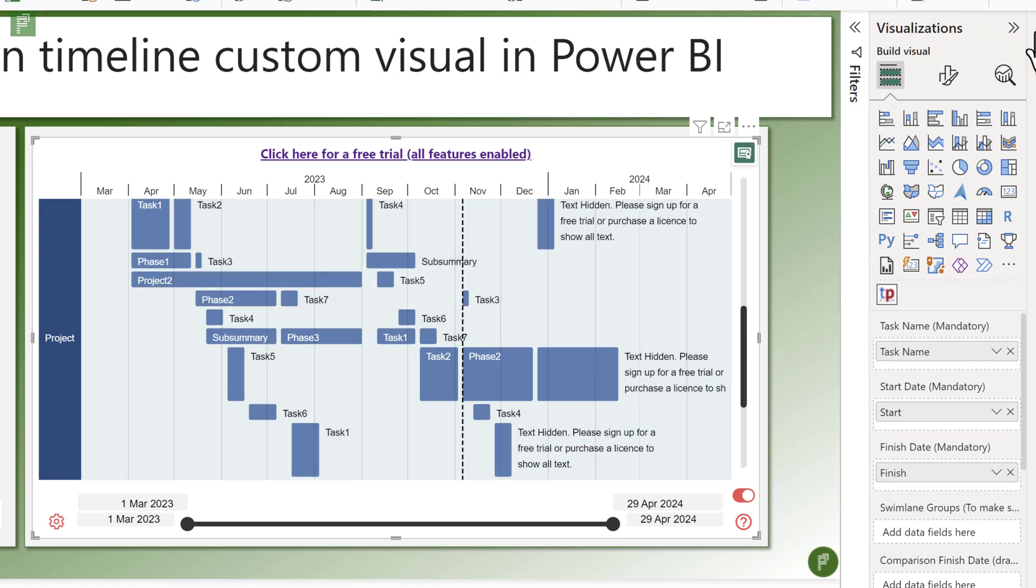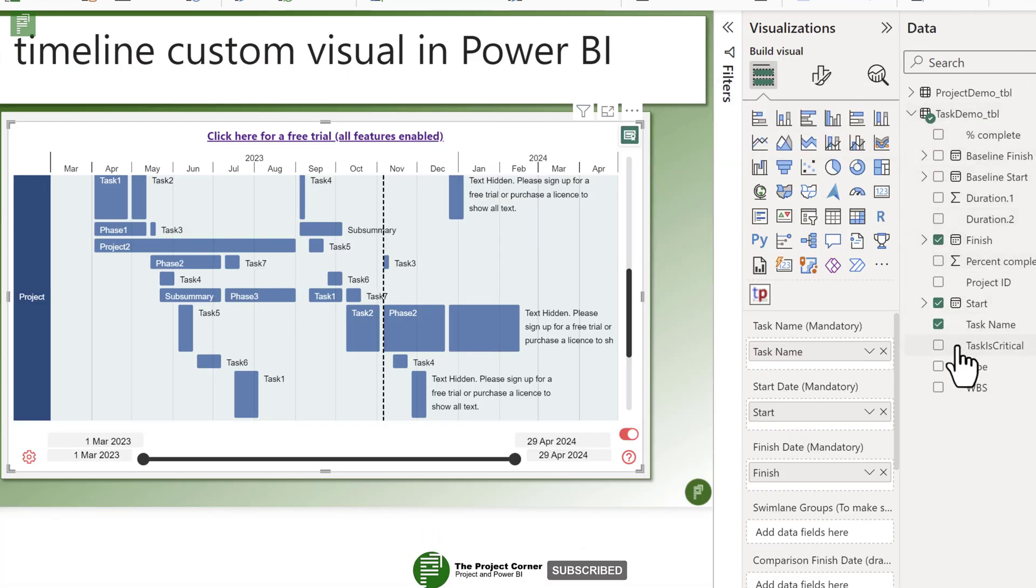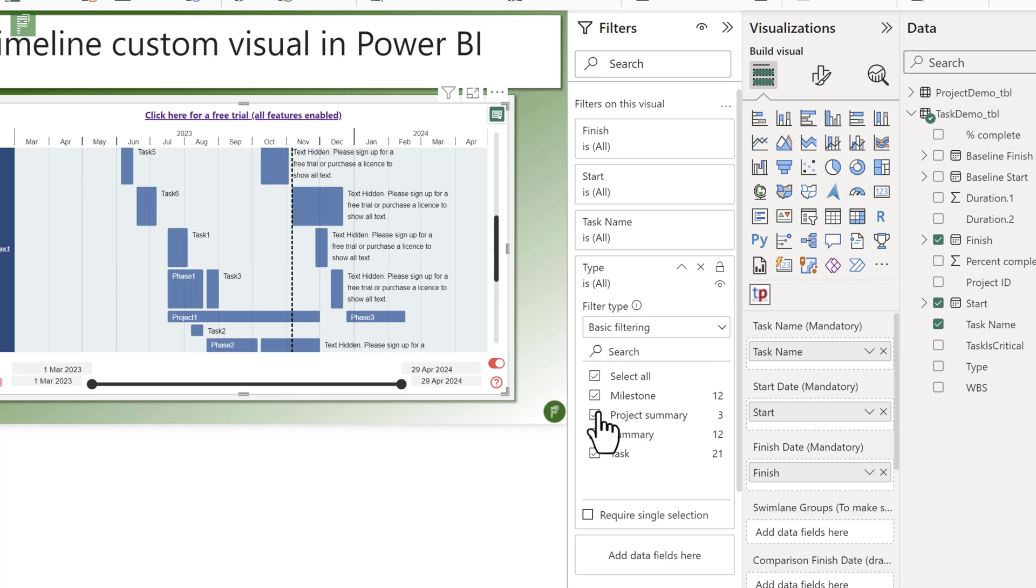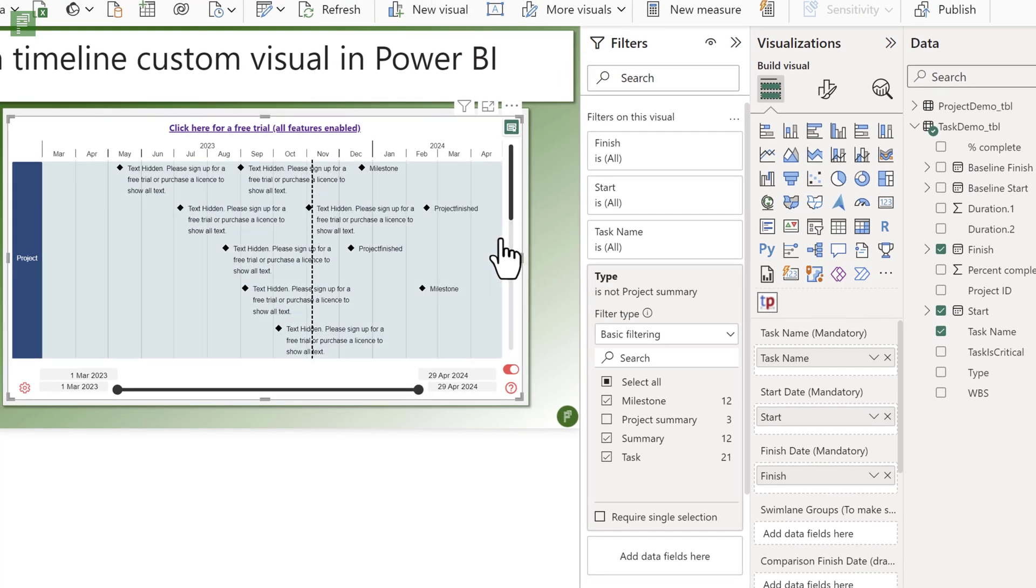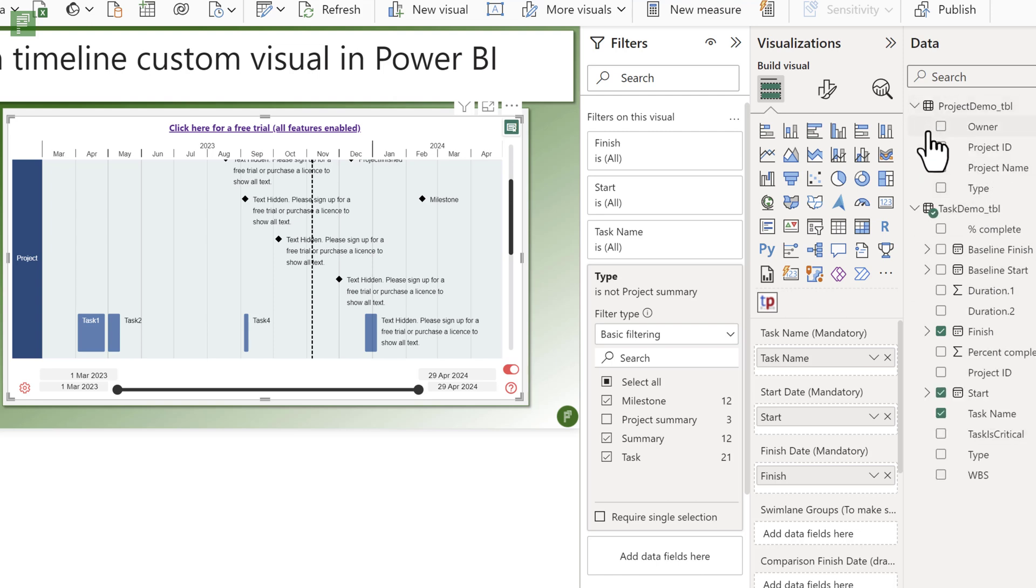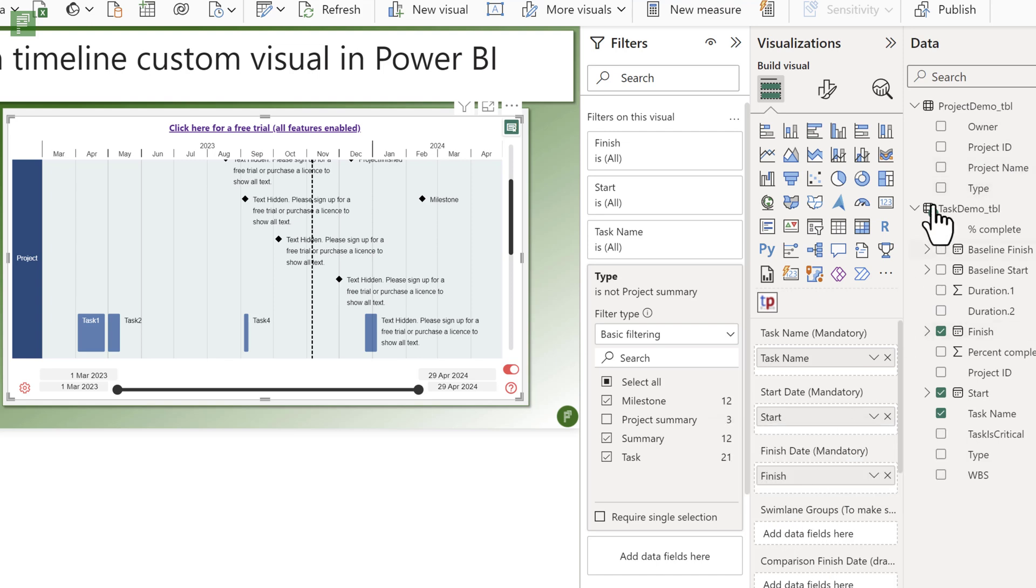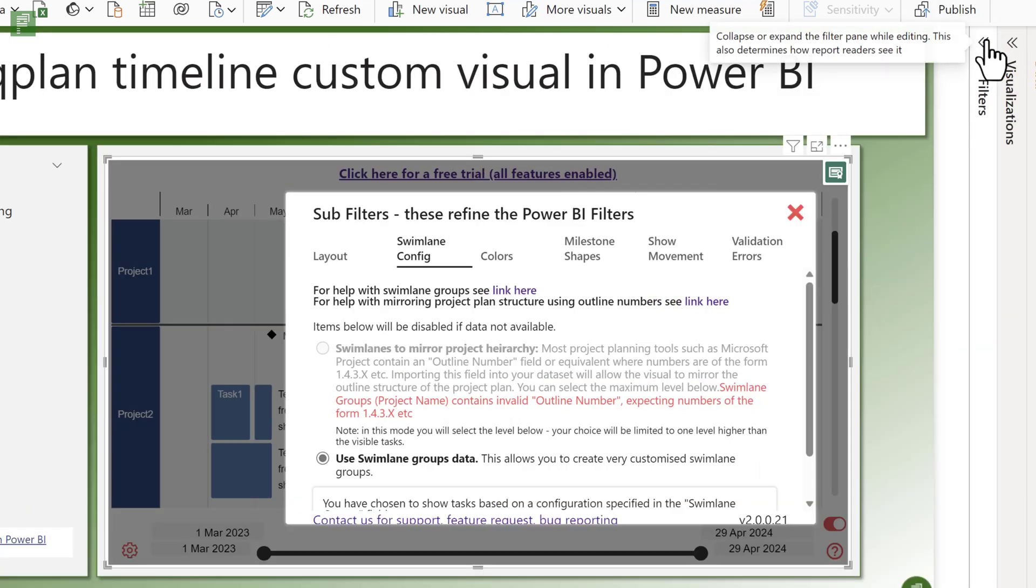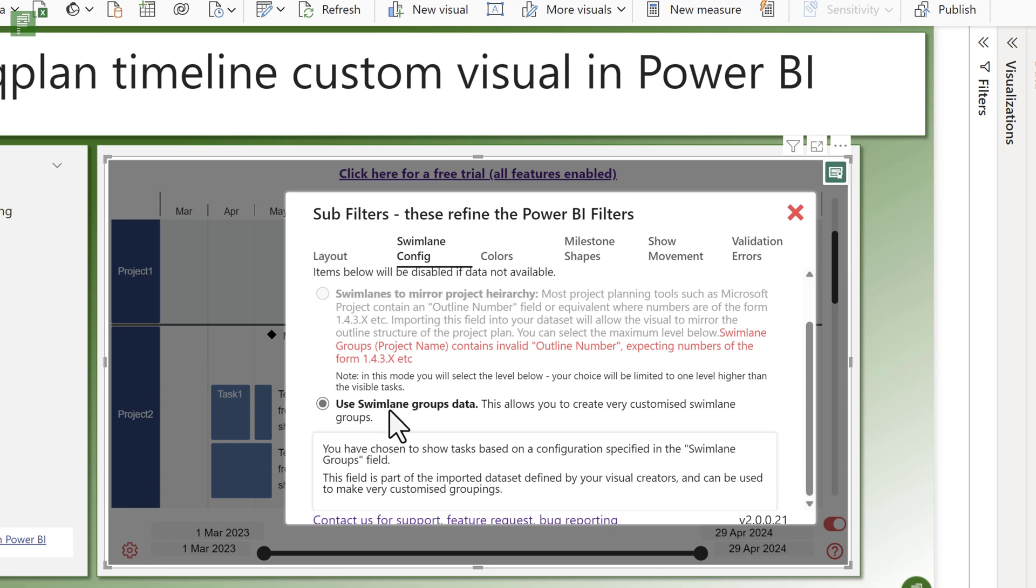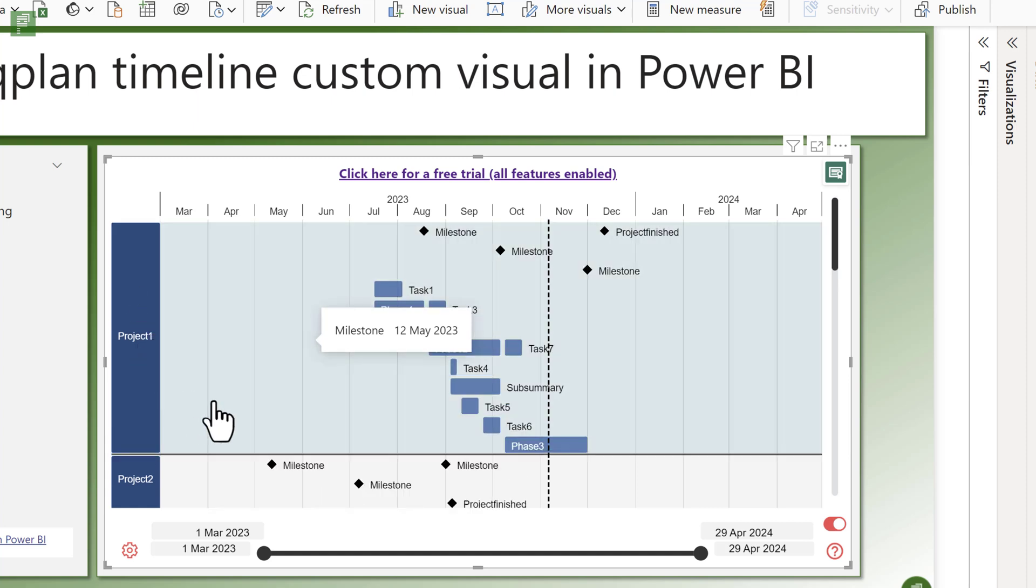So what do we need to do? We want to clean this up just a little bit where there needs to be an outline for the different projects. So what I have in my data, I have the different types of tasks. So I have a task type, and in the task type I also have my project summary, and I want to exclude that data so that Project 1 doesn't show up in here. This looks a lot better. Now I want to differentiate between the different projects because this is all of the projects that we see here. So in order to do that, I find my project name, which is in the project table of course, and I find this section that's called Swimming Lanes.